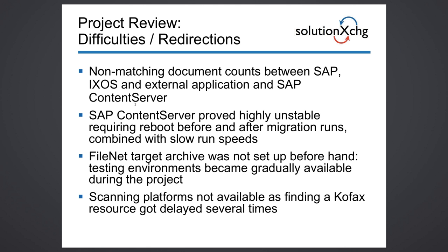So there were old documents and document orphans, documents without reference. We analyzed that. We brought it into the open. We had some executive decisions made that we could safely ignore these documents because they were not relevant for that particular migration.